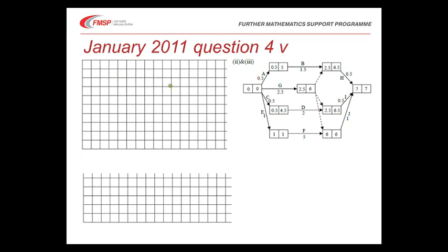I'm just going to go through my diagram and turn this into a cascade chart. Then I'm going to look at how one person could do it, given that B, D and F don't require somebody on task for those activities. So if I label my horizontal axis with time, with a square for each half minute, it looks like this. I can then fill in activity A to begin with here, taking half a minute, and then B taking 1.5 minutes after that.